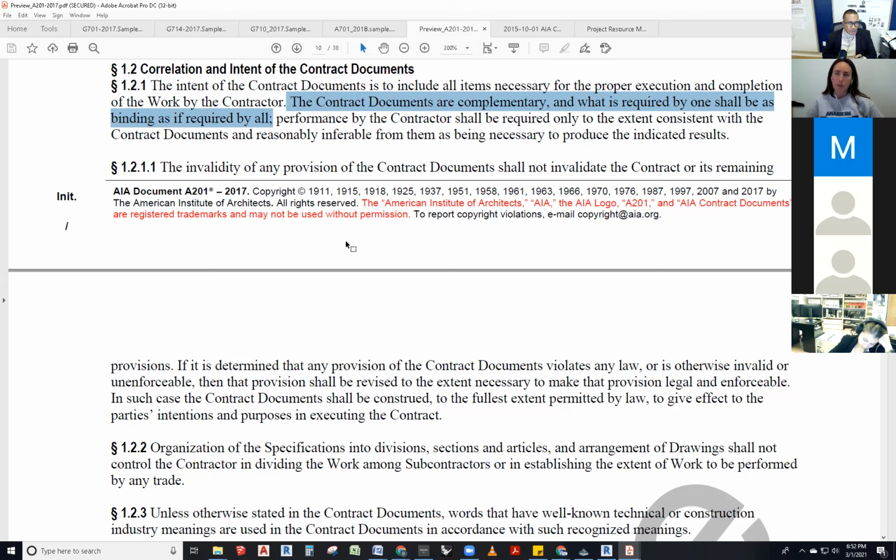So let's say there's a mistake on the architect's drawings that doesn't affect cost, scope, or anything of that sort. Can you just pick up that mistake on a shop drawing? Like, let's say it's a different color or a cap type for a mullion or something. Well, the contract documents are not perfect. That's one thing, right? So yeah, you could pick it up on that end, see it, and be like, oh no, that's really not the color that they ended up deciding on. They probably saw not the most up-to-date drawings or whatever, right? You can pick it up there and say that's not the color that we wanted.